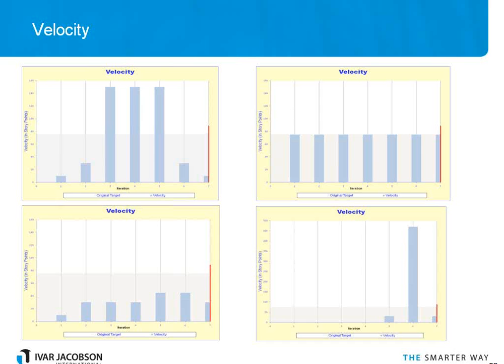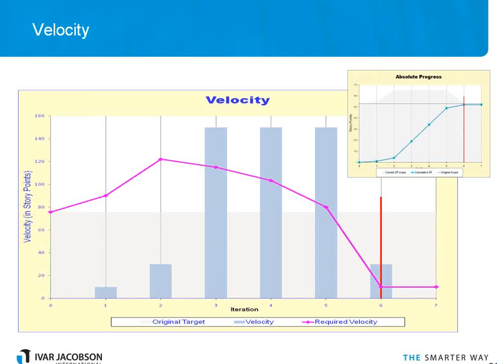So if you broke things badly enough, you could even achieve a negative velocity within a project, within an iteration. When we're tracking velocity, we like to show, compare against the average velocity, show the velocity. You need to think about the progress at the same time here. But we like to add a purple line. Now that shows what velocity we'd need over the remaining iterations.